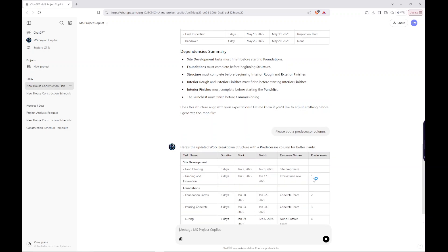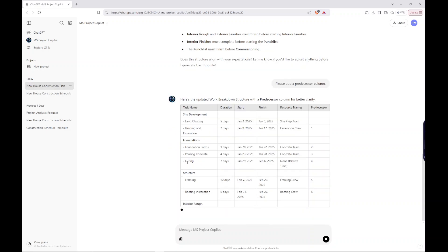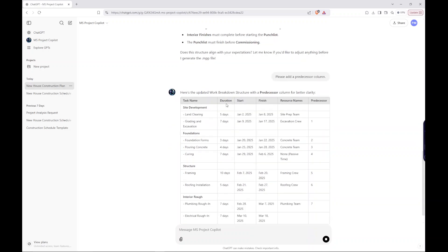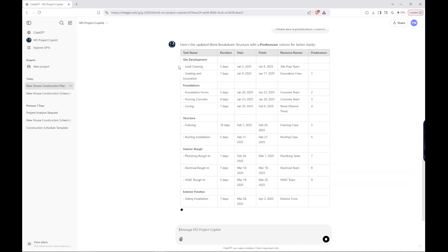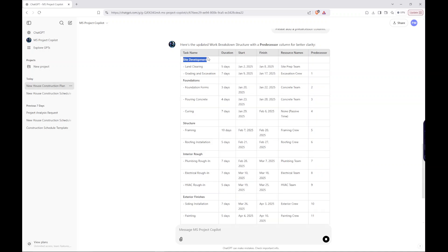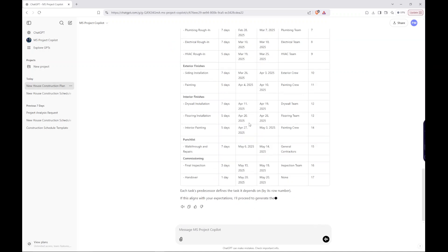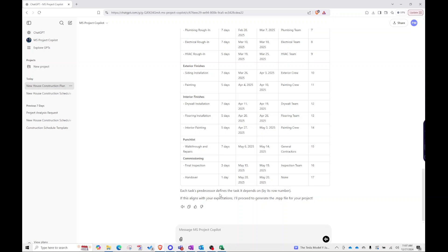So what I don't like is you have grading and excavation, and that's tied to site development right here. And it should be tied to the land clearing. And I've run this example a few times on my own. And what I know is happening is it doesn't know that these site development rows should be summary tasks.